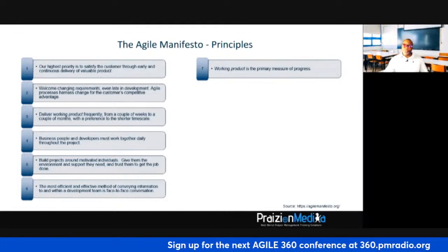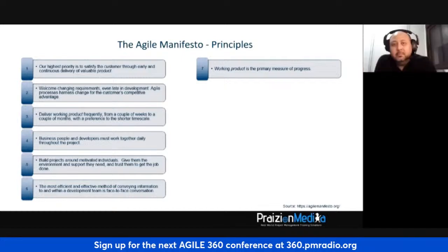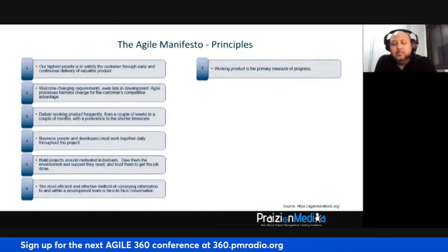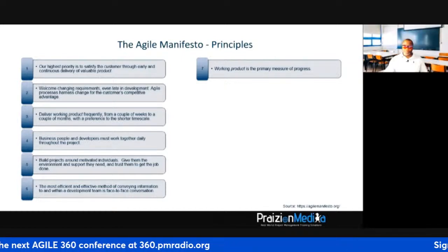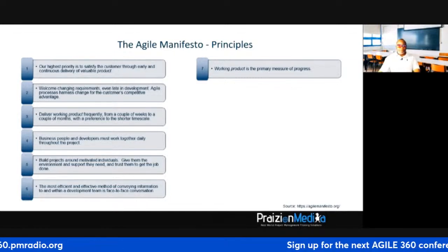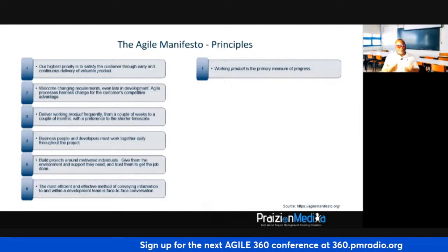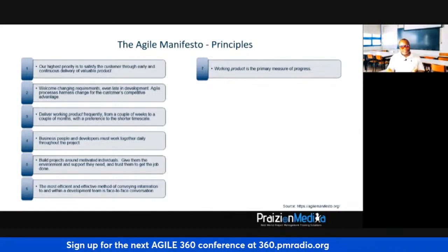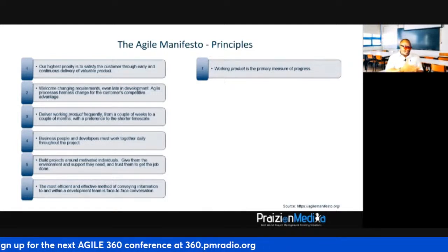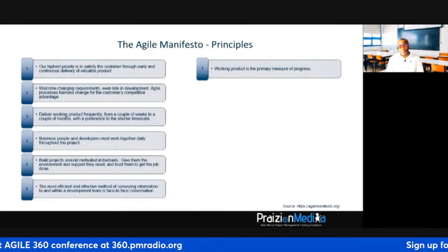The reason why we don't do that is this. If you're doing things in 2-week sprints or even 3 weeks or 4-week sprints or iterations, same thing. We already know that at the end of 4 weeks, you're done. So what is the point of doing % completes? It's only a waste of time and a distraction.